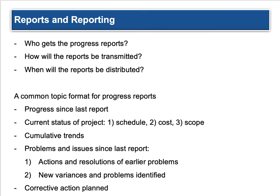A common format for progress reports includes: progress since the last report — how has it gone since your last milestone; current status of the project covering schedule, cost, and scope; cumulative trends — positive or negative and how they affect the potential outcome; problems and issues since the last report, including actions and resolutions of earlier problems; new variances or unforeseen problems that need diagnosis; and your corrective action plan.